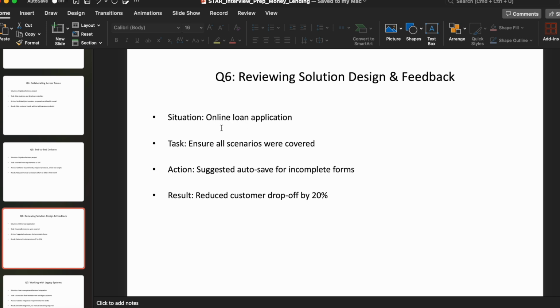While you are building, the business may have some idea, and maybe due to a communication gap you capture it wrongly. So this can cause project delay and some bugs, right? To avoid everything, you can have an end-to-end solution review or design session, and invite all the parties, all the stakeholders. After everyone confirms and is aligned, you can start developing your user stories. This is what they are covering here.